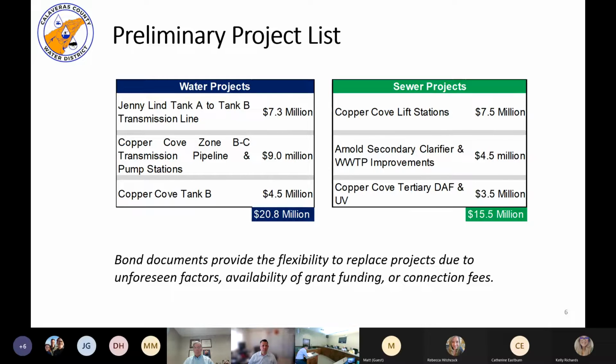So we may not have as significant an interruption in service if lift station 2 backs up, although that will interrupt service, but it's also situated right next to a creek. And so if that backs up and spills into that watershed, we're going to get hit with pretty significant regulatory penalties. So that increases the consequence.